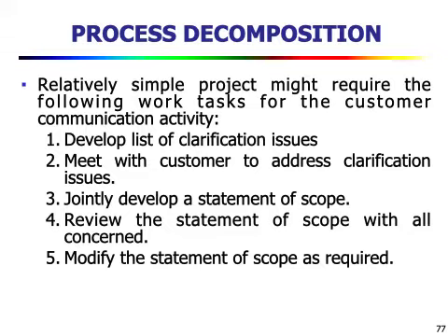Then the process decomposition is done. A relatively simple project might require this kind of work task: develop a list of clarification issues, meet the customer to address clarification issues, jointly develop a statement of scope, review the statement of scope with all concerned, modify the statement of scope as required, etc. So these are some of the work tasks for simple projects.